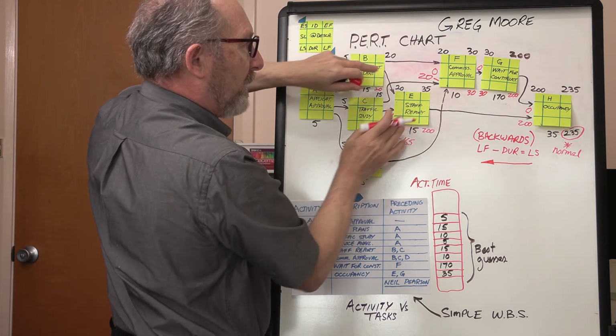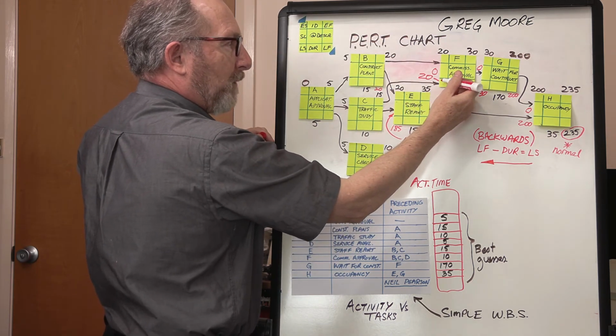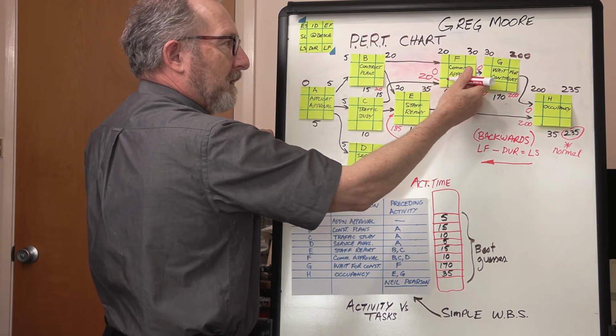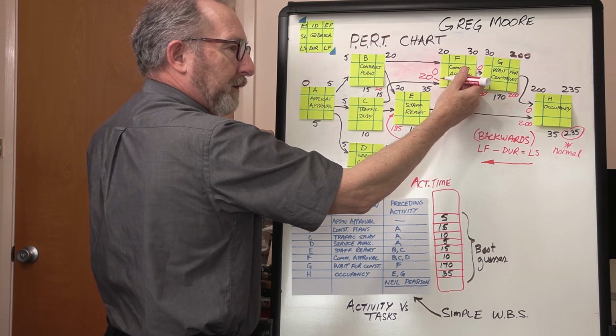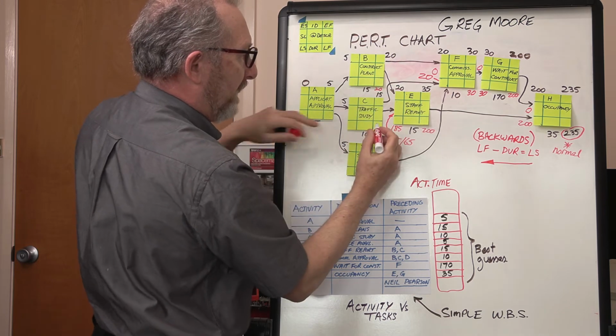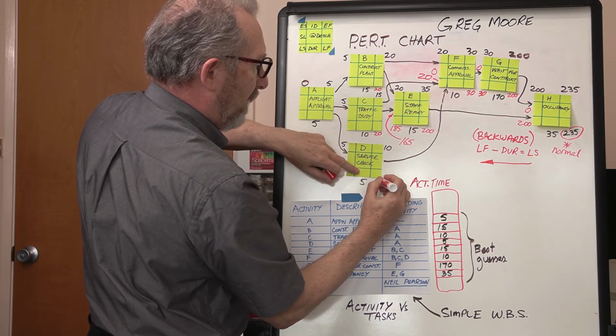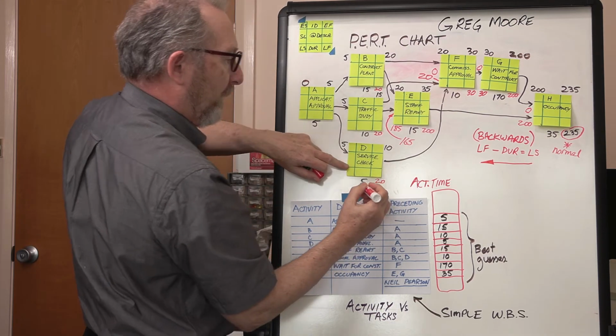Yes, a merge. We had three things merging to give me this. So in the Backwoods Pass, we have to do a burst. And I can take that 20, I can put 20 in there, 20 in there, and 20 in there.